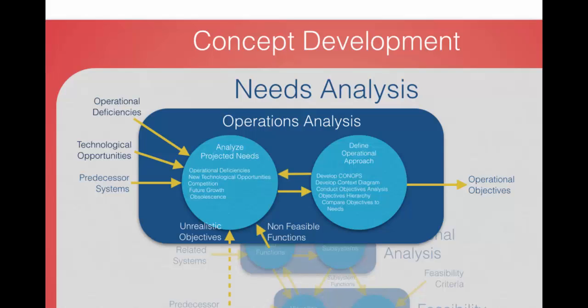It's also important to think about the capability you're bringing to the existing system and how it meets the initial need. If a new technology is being inserted, that new technology also comes with its own set of constraints, which must also be taken into account. For example, attempting to integrate some new sensor technology into a satellite when that technology has only been demonstrated in a laboratory environment and was not designed for use in the extremes of space.